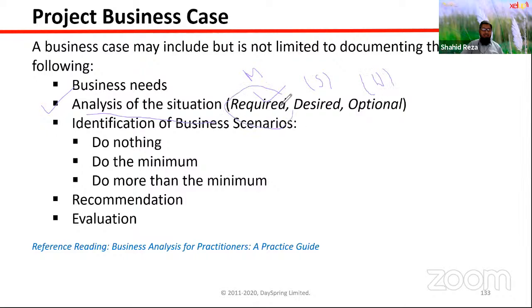When can a project be required? Say the government imposes something, a new law enforcement comes for the industry, for your organization. Then that project is required, right? So that will be mentioned in the business case, whether this project is a must project, a desired project, or an optional project.